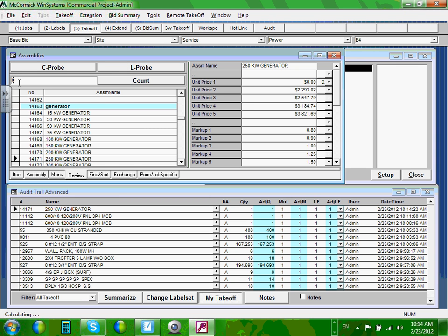But make sure every single power component, chillers, don't worry about them. The chiller itself, all the mechanical equipment themselves, we don't take them. We take the disconnect for them and the feeder, but not the equipment. Electrical equipment, yes.